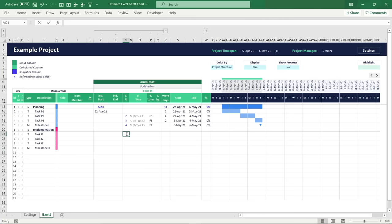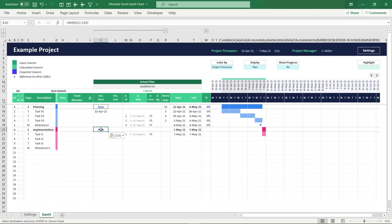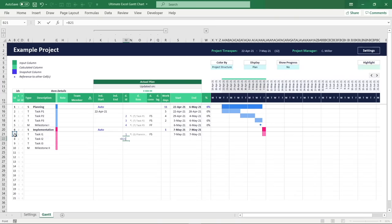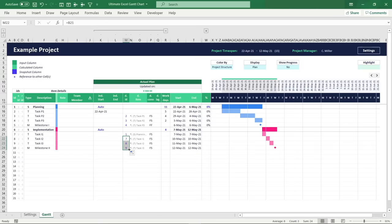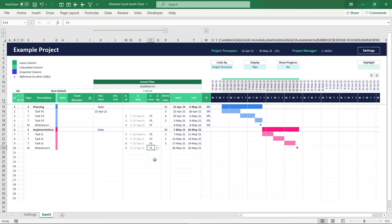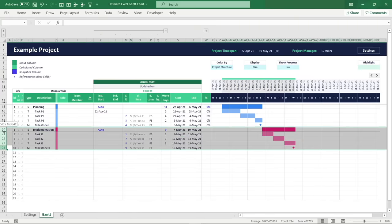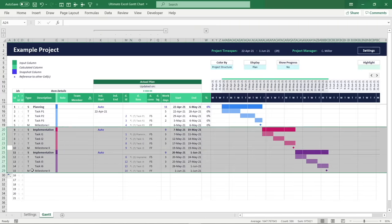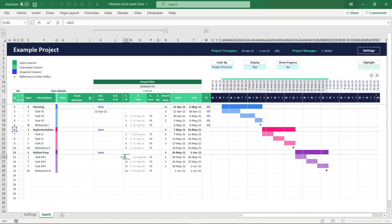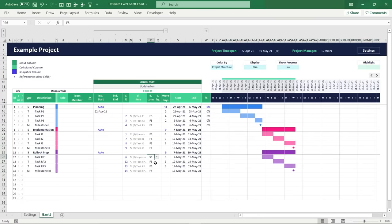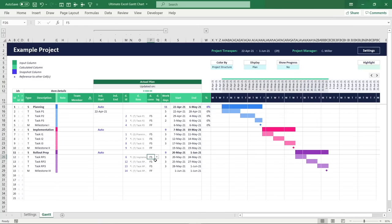For a forward-oriented stage dependency, you only need to make the initial item in your stage dependent on another stage. A set of standardized formulas then allows the stage to update based on its items. You can make the other items consecutively dependent on that initial item, define the number of workdays, and ensure the milestone ends together with the preceding task. It will only take seconds to add another consecutive stage with the same forward scheduling dependencies, with the stage start date tied to the other stage, making the timespan grow into the future as workdays increase.